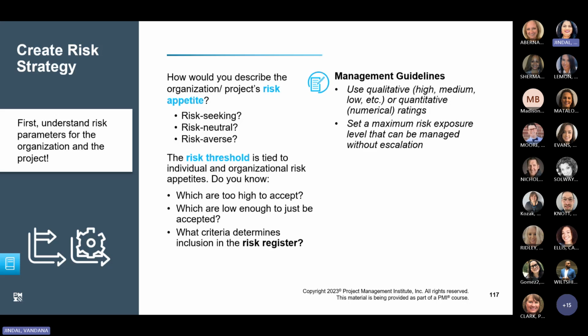Risk tolerance is the degree of uncertainty a company is willing to handle. So the tech startup might have a high tolerance for, let's say, risk associated with market competition, but they may have a low tolerance for risk associated with legal compliance, since legal issues can be catastrophic for small businesses. And then we have risk threshold.